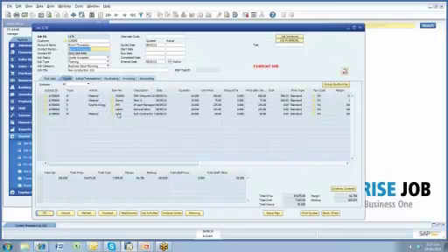And for the example where I have my subcontractor, which is a purchasable non-stock item, it'll also raise a purchase order for that as well if I want it to. So that's the stock check inside a job, commonly used if you're doing a manufacturing type scenario.